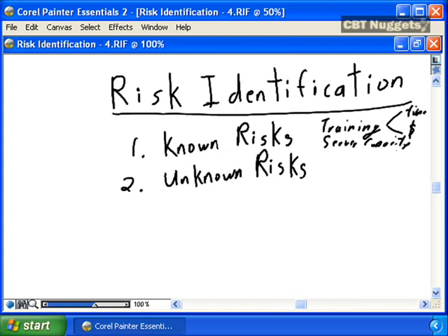Going into the project, you believe you have sized the server with the appropriate capacity to satisfy the application requirements. But there's not a line of code written. There are no measures against how well the application will actually perform. You believe you have sized the server appropriately, but there's a risk that you may need to build a bigger server.